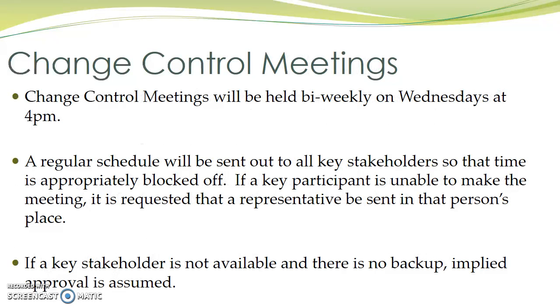Meadowview Hospital will implement regularly scheduled change control meetings. These will be held bi-weekly on Wednesdays at 4 p.m. A regular schedule will be sent out to all key stakeholders so that time is appropriately blocked off. If a key participant is unable to make the meeting, it is requested that a representative be sent in that person's place. If a key stakeholder is not available and there is no backup, implied approval is assumed.